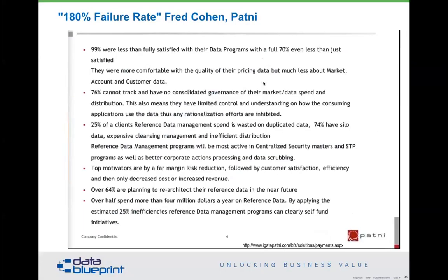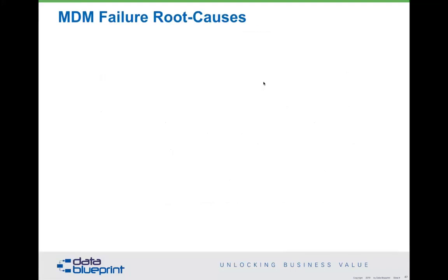Now, there's lots and lots of failure problems that are associated with this. I'm not going to read all of these things to you, but the general piece on all of this is that MDM is as failure prone as any IT project, which means it has a 1 in 3 chance of succeeding with full functionality for the cost that it was supposed to be within the schedule that was provided. That's not good. I keep telling people, if my dentist was that bad, I would absolutely find a new dentist. Again, lots and lots of these numbers that are problematic in terms of this.